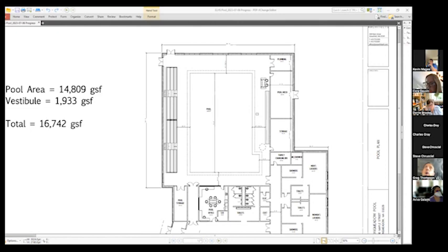So if we a la carte it from there and say, all right, if we want to go 8 lanes, it's this much more. If we want to go a longer well. The only thing I don't know about there is the smaller well. We've never made any decision about that, and I don't think our numbers have assumed that. So I think we've been, frankly, probably assuming a continuous depth. But that could potentially save us a lot of money based on gallons of water and then fixtures required to meet those gallons of water.